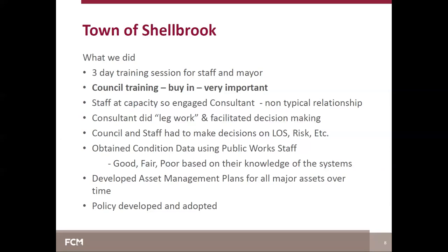Our consultant did the legwork and facilitated decision-making sessions, but council and staff had to make the decisions about things like level of service and risk. For condition data, we sat down with our public works staff who are familiar with our systems and ranked segments on a good, fair, poor basis using their knowledge. Over the next number of years, we developed asset management plans for all of our major assets, with the last plan completed in 2017.